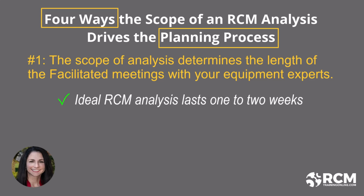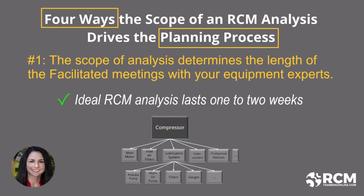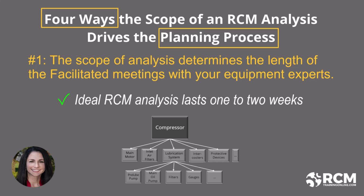In my experience, the ideal RCM analysis lasts 1 to 2 weeks. For example, analyzing an industrial air compressor might take 2 weeks, while focusing solely on its lubrication system could take just a few days. These estimates assume you have experienced and knowledgeable experts, you have gathered all necessary technical documentation, and you have a commitment to consistent participation from all working group members.